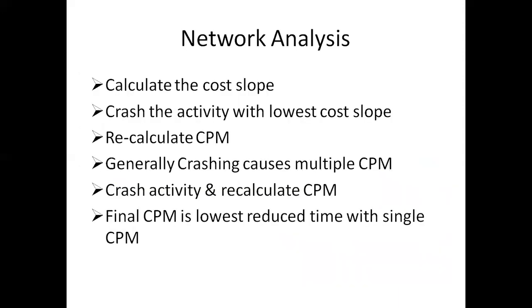We recalculate the critical path, because once we do a crashing, we generally have multiple critical paths. We then have to use the crashing technique for all those critical paths again and again until all the paths give the same number of days, or we have a single critical path. This ends our class on project crashing.